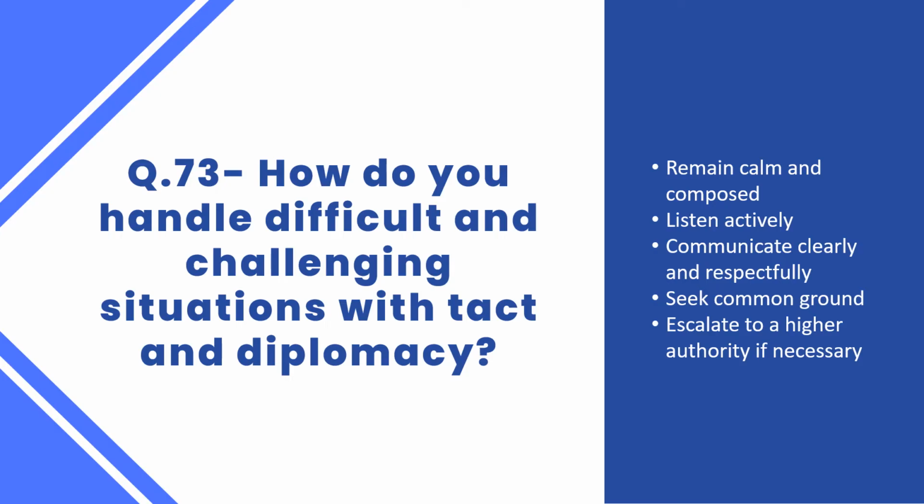I also communicated with my team to ensure that they understood the situation and the impact of the scope changes on their workload. I sought common ground by finding a solution that would benefit both the client and the project, such as implementing a change control process to manage scope changes more effectively.